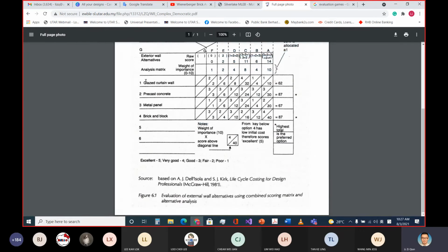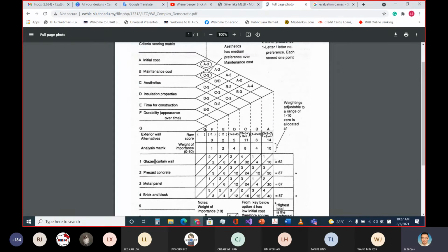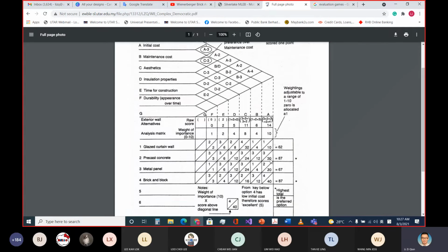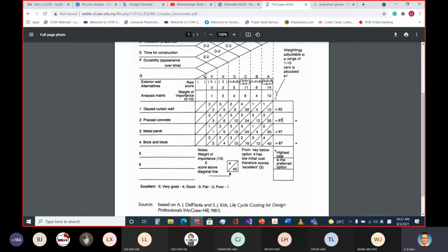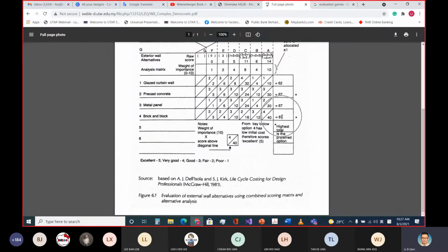After this, at the bottom, the first one you list as the original item, and the subsequent ones are your alternatives. Then you need to know, for your original item, how good is it with the initial cost? You give the rating. Then you multiply accordingly, and now you just sum. In the end the highest will be chosen for the development phase.